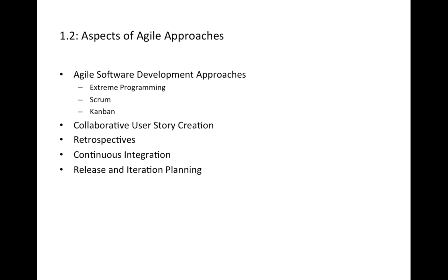Okay, I understand. The test-related issues can be the scope of the testing, the extent of testing for areas in scope, the test goals, the reasons for the decisions, the test team members who will carry out the test activities, and the project and quality risks. So these are the test-related issues we need to address in release and iteration planning.